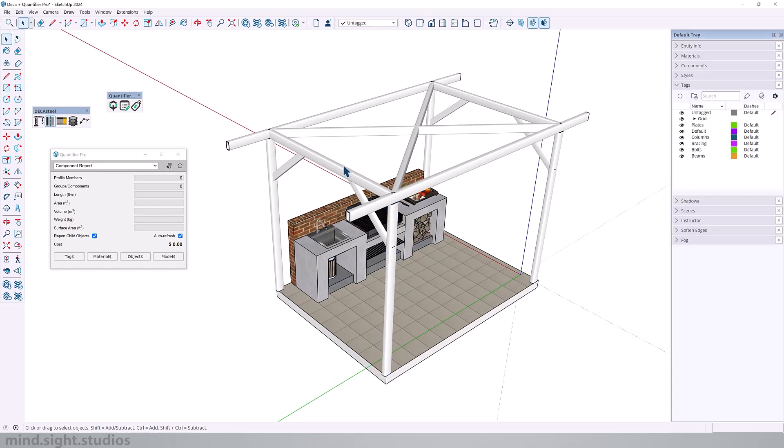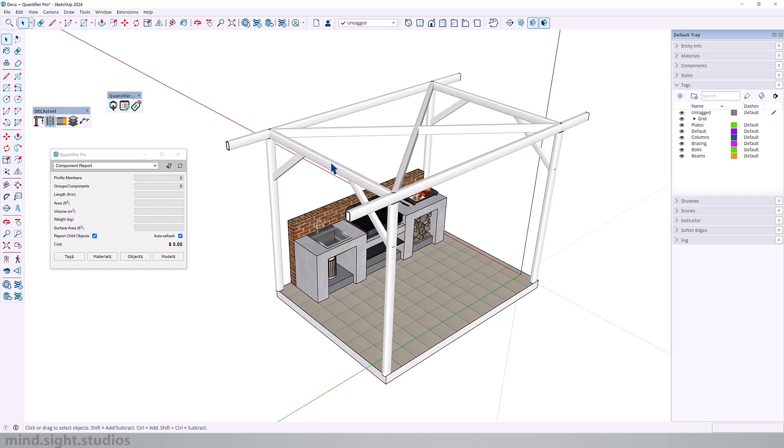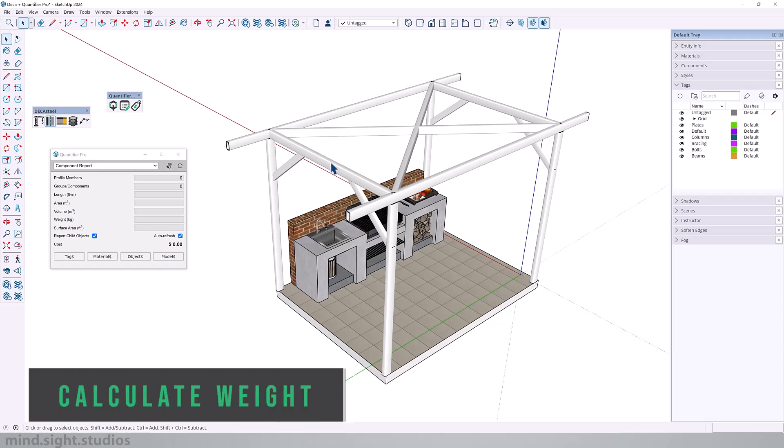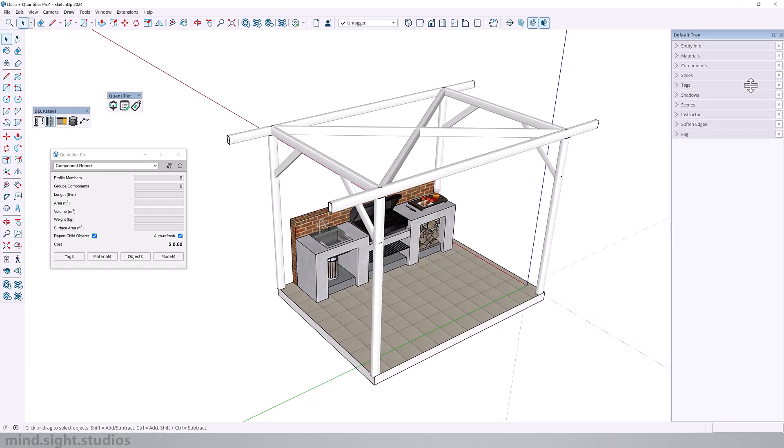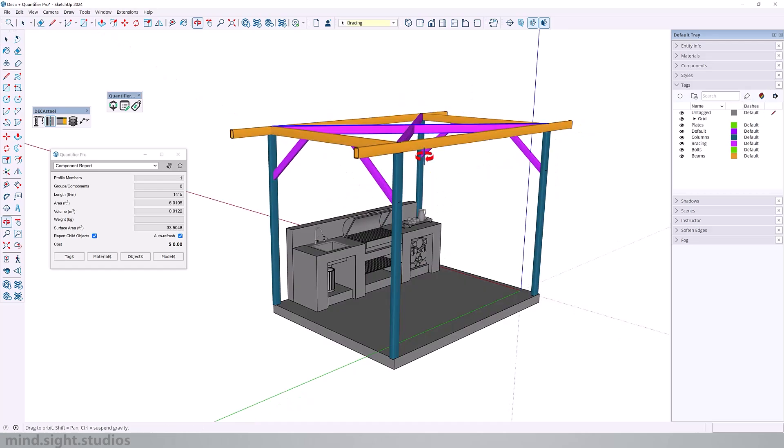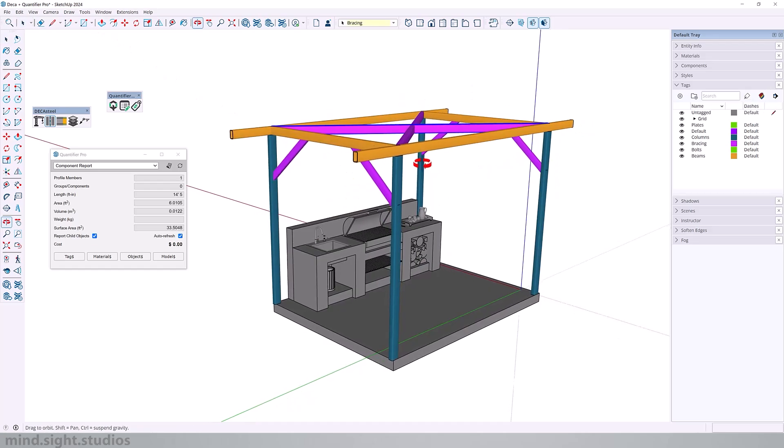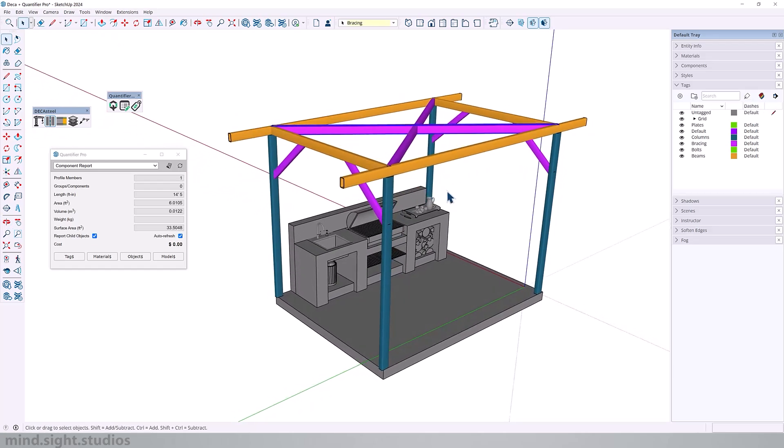So all of these structural elements were created with a deck of steel, and each one is assigned to its own tag. This is a very important step because it's one of the ways you can determine the cost value of your model. So to calculate the weight of the steel elements, we need to add the density value of steel into Quantifier Pro. And if we turn on color by tags, you can see by the color that each one has its own separate tag, but everything is categorized as steel.